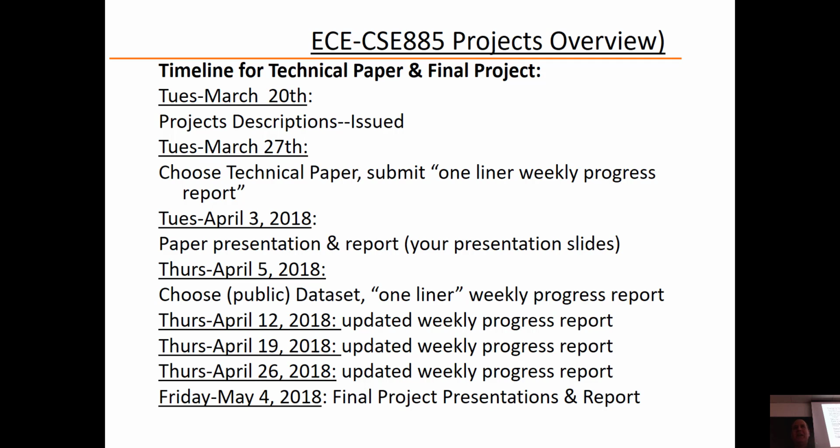So the idea, every week you have a progress report, which is bullets or lines or itemized, and you submit them through GitLab. And the next week, I just take the original one, I update it, I add more things, submit the next version of it, and so on. So we have a working document that has the history of your progress, and it's updated every week, okay? And you could lump them both for all activities, or you can have them separate. That's your choice. We'll talk about this one here, and then after that you have weekly progress, weekly progress, weekly progress.